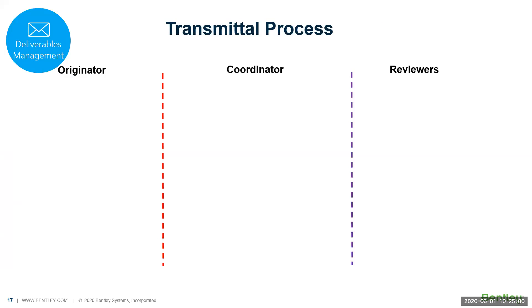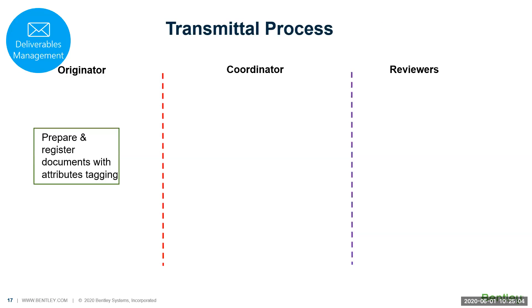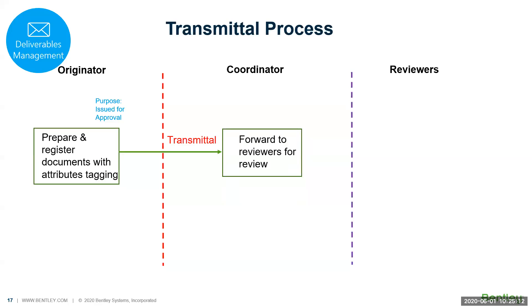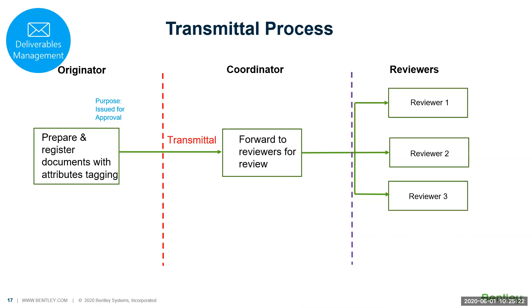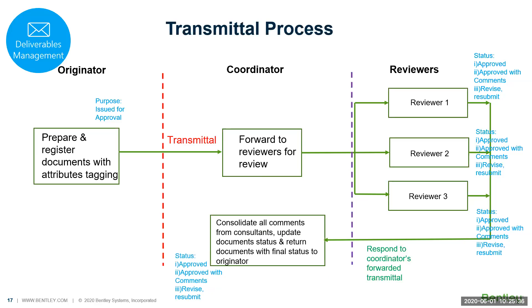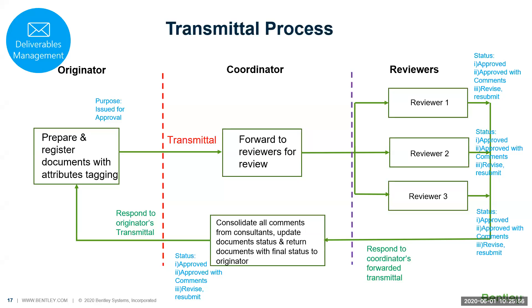On the deliverables management process, you have the originator who uploads a document, tags the metadata onto the transmittal, and then sends a transmittal to a coordinator or reviewers. The lead reviewers can be your lead architect or lead engineer, and they can respond. If they cannot, they can forward to more reviewers internally or externally. Each of them can give a status. By giving the status, it will come back to the coordinator to consolidate all the comments from the consultants and then update the final status before returning to the originator. This will close the loop and respond back to the originator's transmittal.